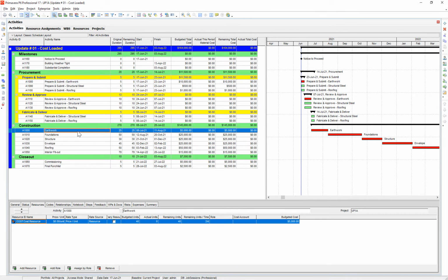Say, for instance, maybe our earthwork is 25% complete, and therefore $1,250 we're going to bill to the period. But then the following month, we want to reset the amount that's going to be billed for that period, because a new pay application is going to be generated each month, and we want to know what's the new amount that's accrued for that month. I hope I explained it well, but that's the goal of this.